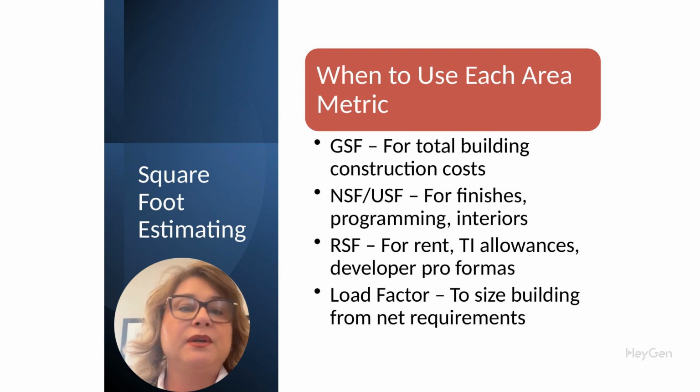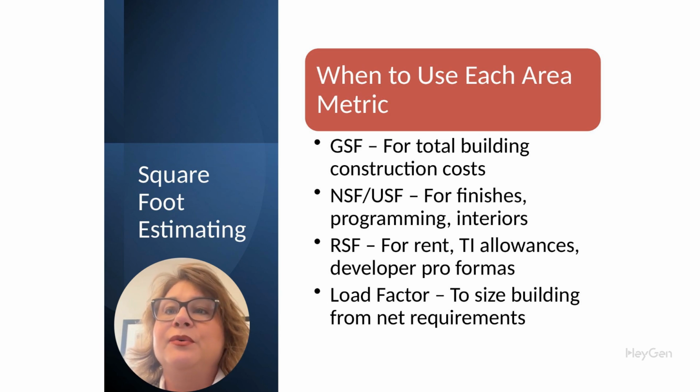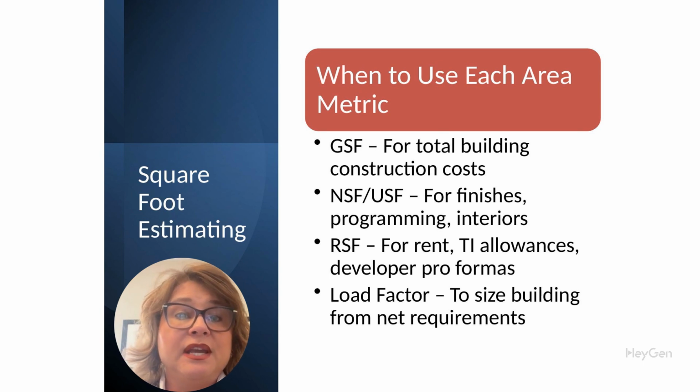4. Load factor. Use the load factor when you're sizing a building based on net requirements. Say a program requires 30,000 usable square feet. If the load factor is 1.25, then you multiply 30,000 by 1.25 to get 37,500 rentable square feet, which might influence the total building size or leasing expectations.